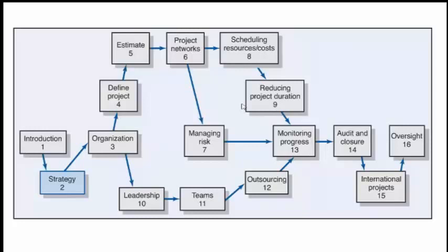Also, what happens is when you make things parallel, the number of critical paths also increases, so you cannot afford to delay even a single path in your project. Also, all your project resources are under severe stress because they cannot afford to have slack time or take a day off, things like that. So that is a problem in making things parallel, so that the critical path becomes higher. If you have one critical path, now suddenly you have 3 or 4 critical paths.